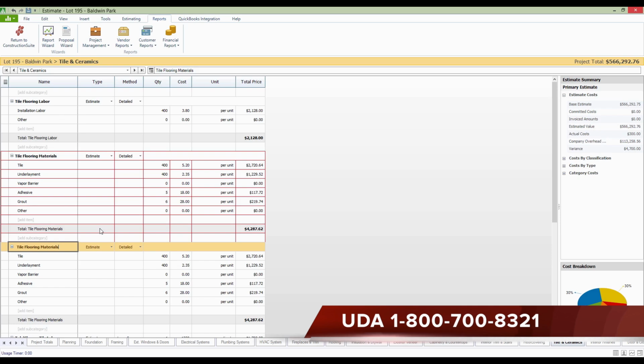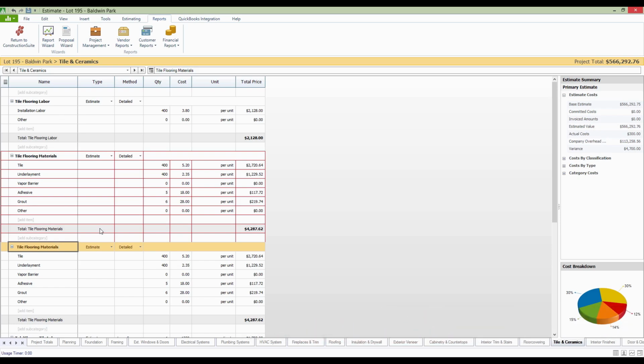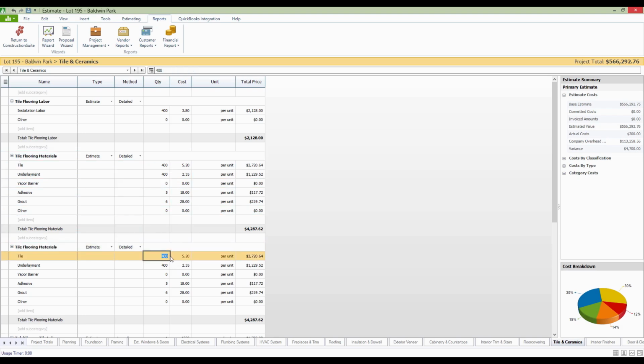This will become important as you're starting to work with QuickBooks, which we'll cover tomorrow. But as you set up this change order now, you're setting up the details for the subcategories associated with the change order, and from here you can go through and keep the name but adjust the prices a little bit to reflect that change order. So if we've got an upgraded cost for the tile, maybe it's an extra $1.50 per tile or per square foot, or however we've priced out the information. If none of the rest of these prices are going to be affected, then we can leave them as such.